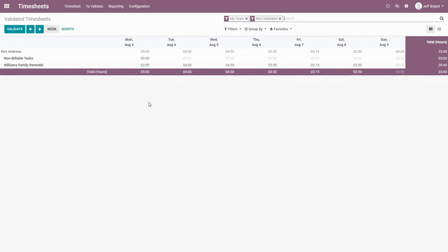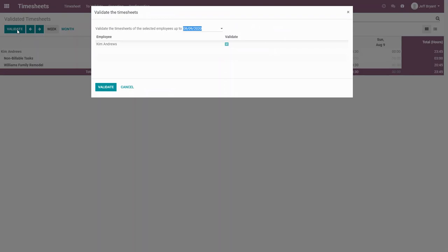And so if I'm her manager or if I'm the principal at the firm, then I can look these over, perhaps ask about where all of the hours came from. And again, as we saw before, you can click into the details to see any comments. And once I'm satisfied that this all makes sense, then I can validate. And this basically closes out that week and says, hey, okay, these hours are validated. And it also indicates that they would be appropriate to bill the client.